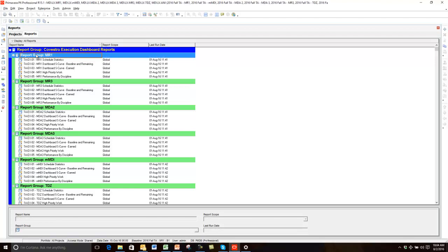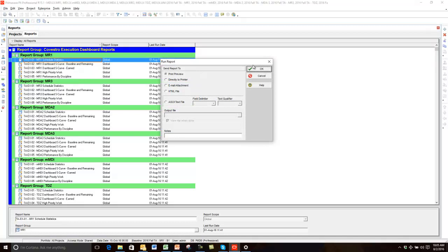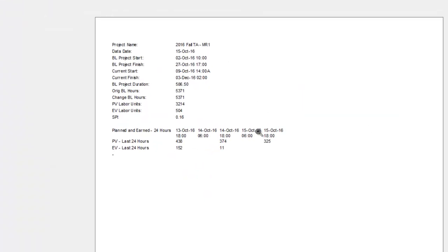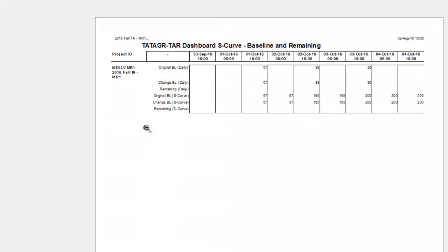I'm in P6 now, and I wanted to point out the reports that are built here. I built a report group for each one of my units — I actually have seven units here, although I've only been focused on one so far. But I'm going to show you how to run this macro against seven units, and for this particular client this is going to have up to 20 units or 20 P6 projects generating reports. Under this particular unit called MR1, there's my schedule statistics report. The baseline and remaining S-curve data is also just a time distributed report that I set up in the wizard — I went to the reports view, added a new report, went through the report wizard, selected time distributed, and it's a summary report at the project level.